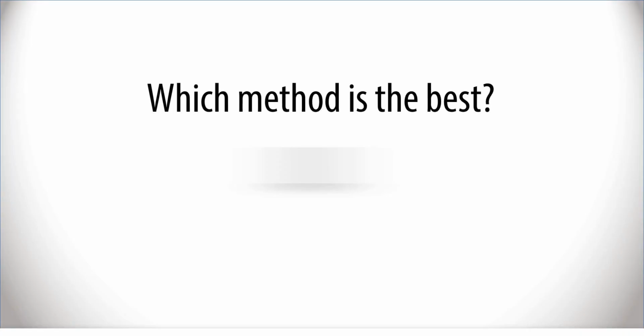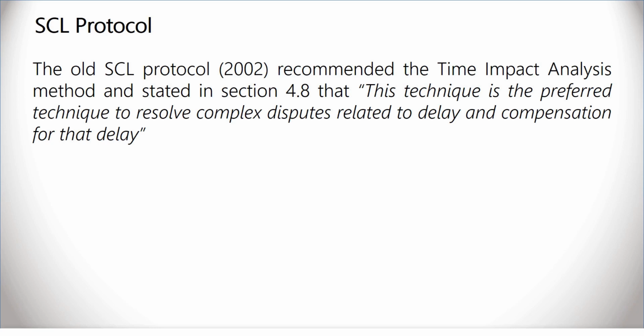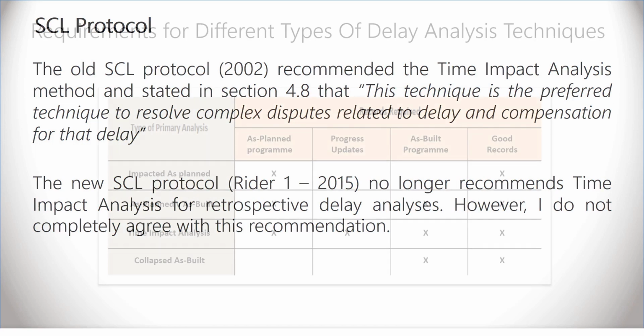So which delay analysis methodology is the best? The old SCL protocol from 2002 recommended the time impact analysis method and stated in section 4.8 that this technique is a preferred technique to resolve complex disputes related to delay and compensation for that delay. The new SCL protocol, Rider 1 from 2015, no longer recommends time impact analysis for retrospective delay analysis. However, I don't completely agree with this assertion, and I'll explain why later on in this course.